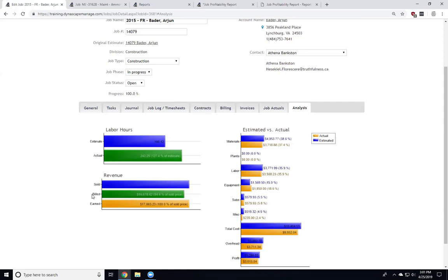I would still recommend, yes, we invoiced it, create the invoices in Manage, so Manage knows we've accounted for that as well. The earned is the job progress. So at any point, theoretically, if we're halfway done with the job, we've earned half of that. So this number will also increase. That's where these come from: the original contract plus any approved change orders, the ones we've invoiced, and the job progress.